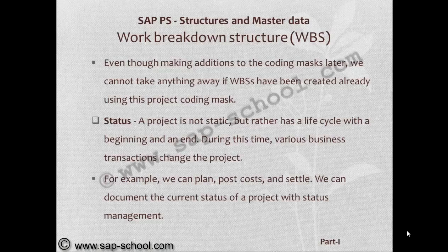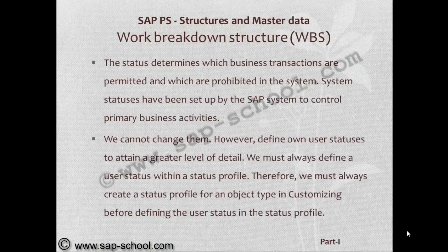During this time, various business transactions change the project. For example, we can plan, post, cost, and settle. We can document the current status of the project with status management. The status determines which business transactions are permitted and which are prohibited in the system.